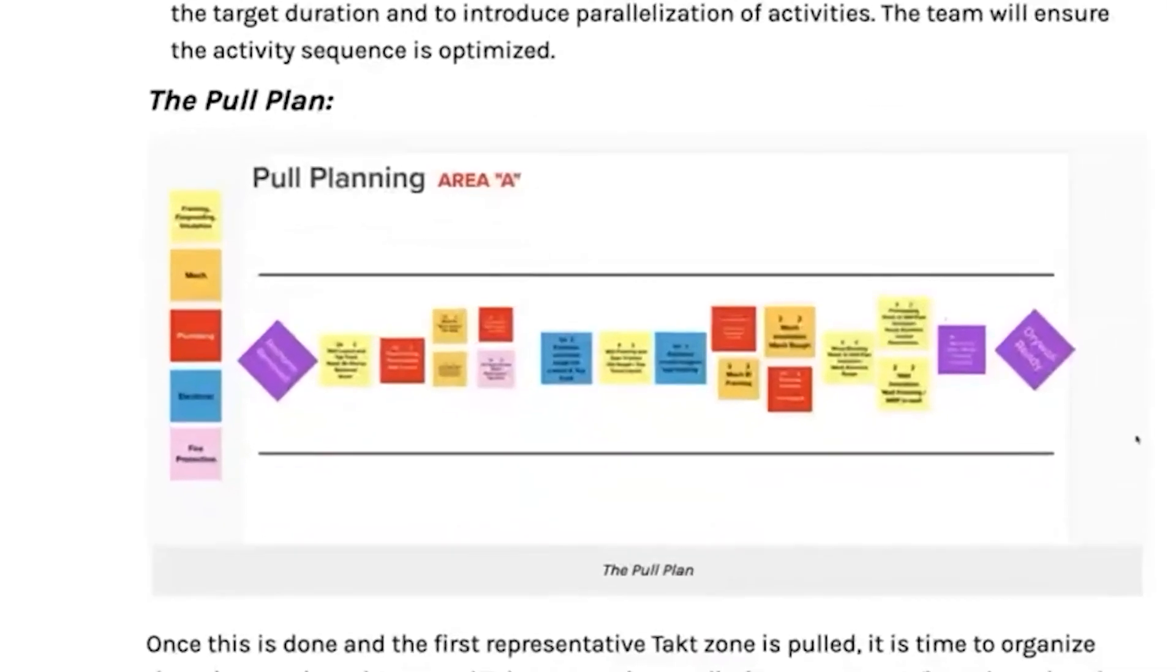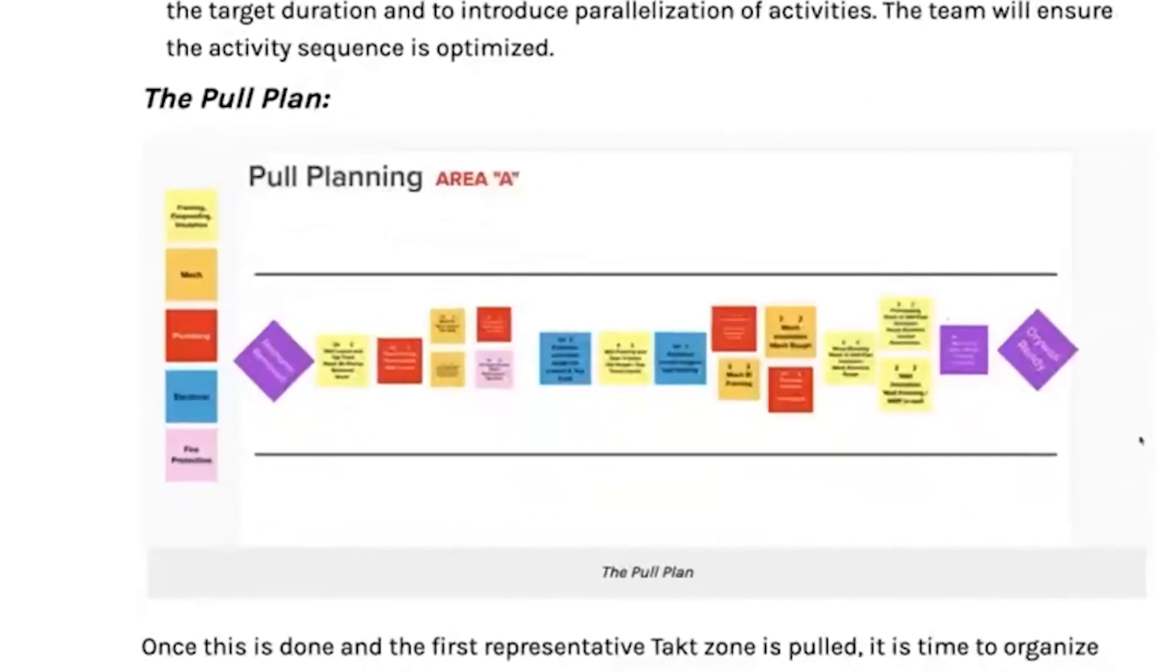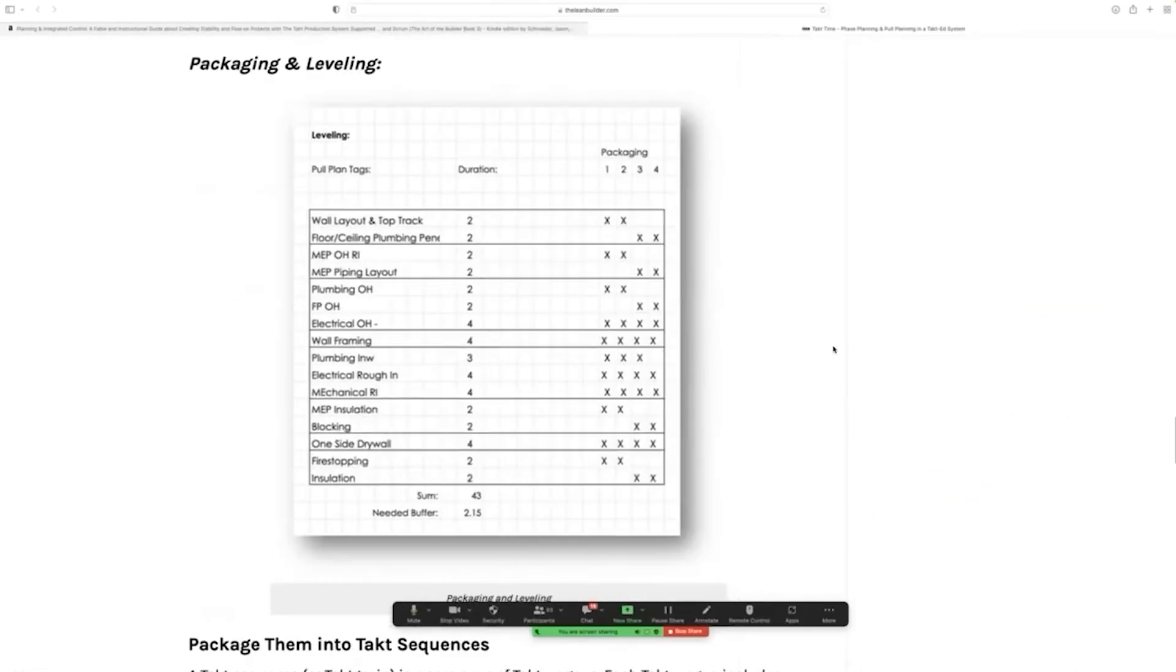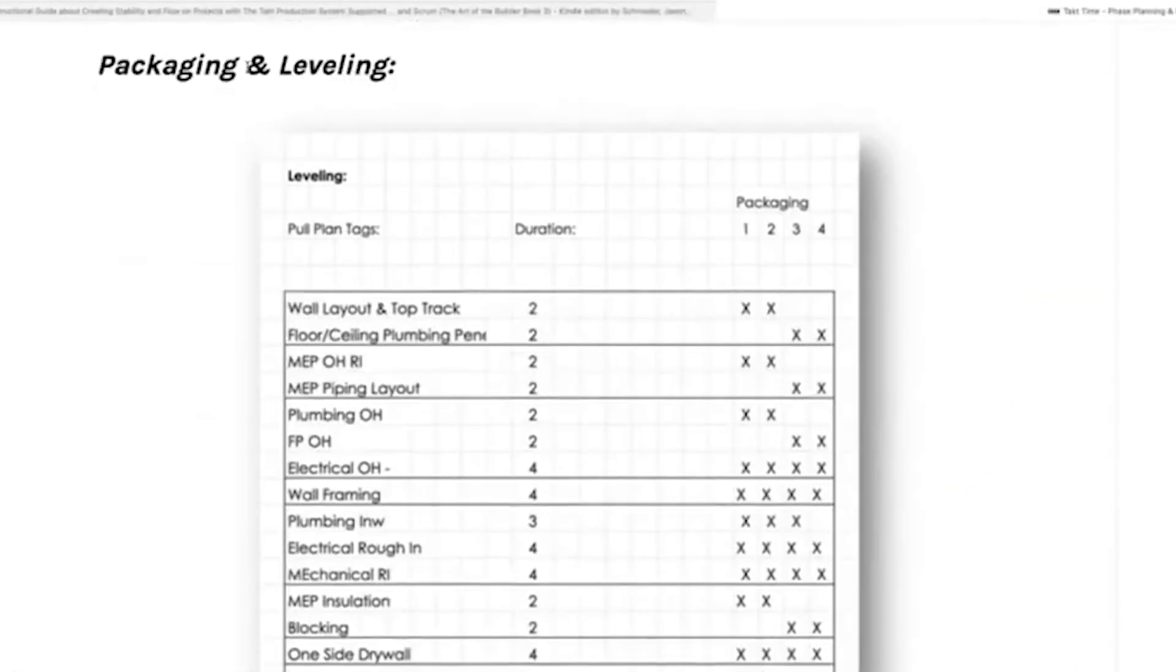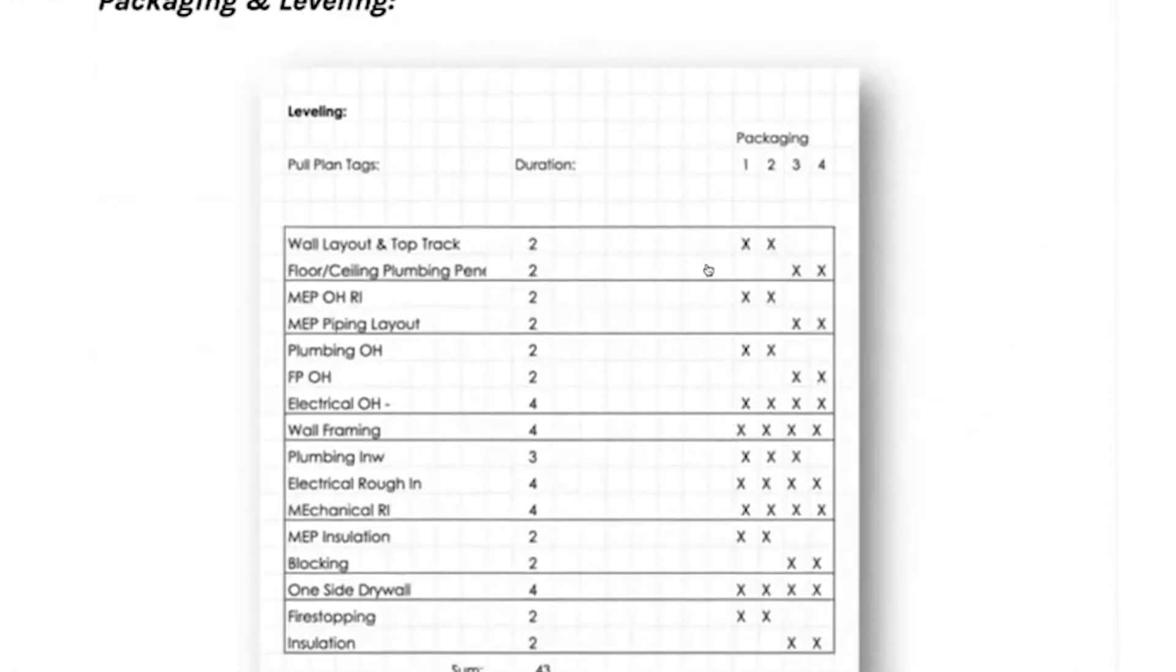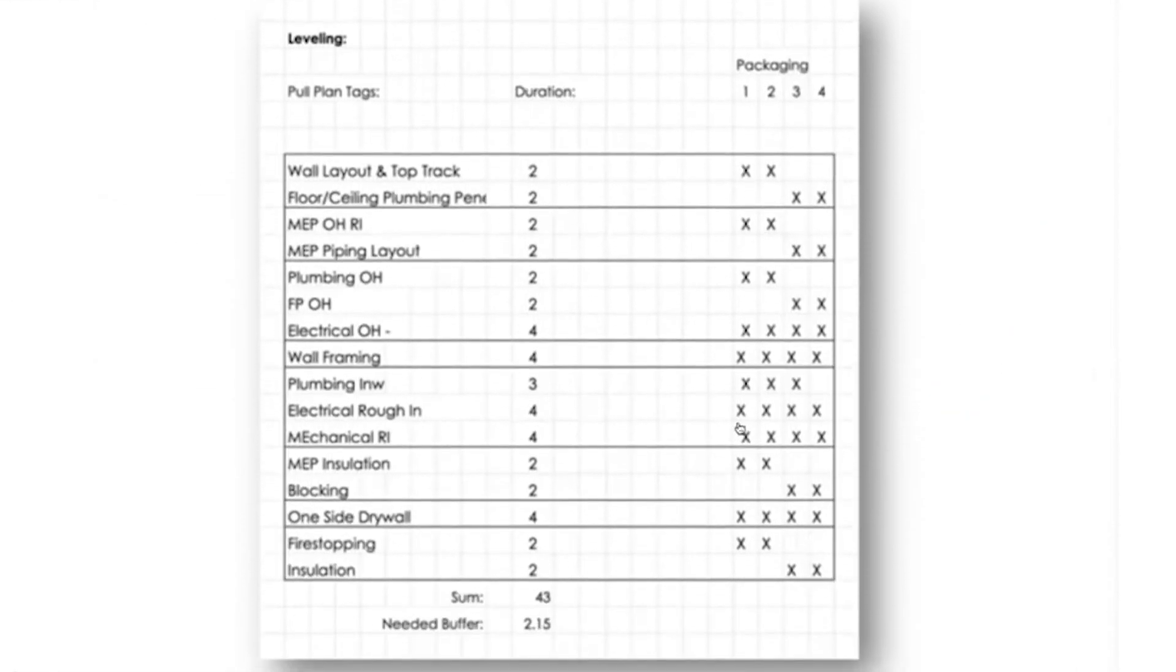Then you create a pull plan for that one single tact zone, that one single representative area. Once you do that, you package and you level that work.